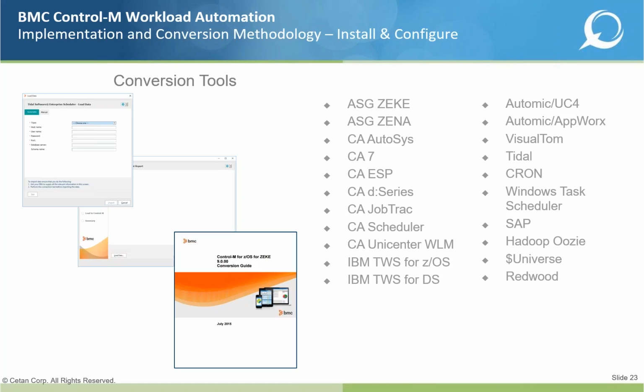In and around that, we're also developing the technical solution design. And this really is the infrastructure design for Control-M: sizing, performance, the high availability components, and all the things that are needed to be able to lay down what I call a production-ready infrastructure. And by that point in the project, we've got everything out there. We've got something that management can review and stakeholders can sign off. And then we're able to start getting into the actual meat of the project, laying down the Control-M environment, testing it, and getting into the actual conversion itself.